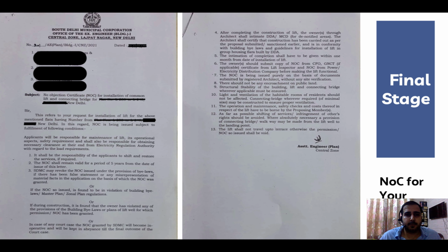As you can see in this project, I have shown you the drawing, and this is the NoC of the same project. This is from the South Delhi Municipal Corporation. We applied for it a few days back, and it came very fast. So this is how your NoC will look like. It is a 2-page document, and it will help you to install the lift in your society.